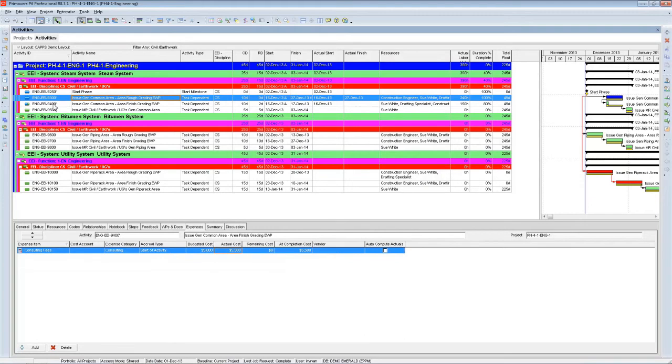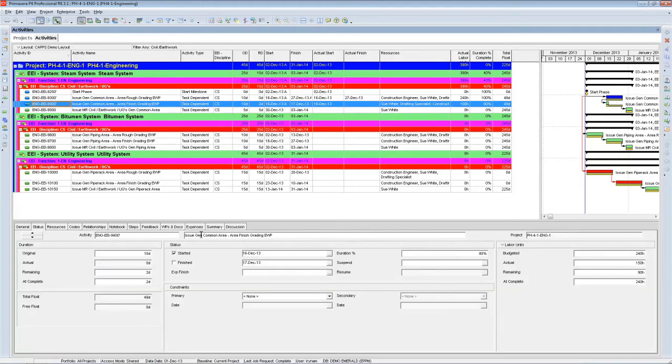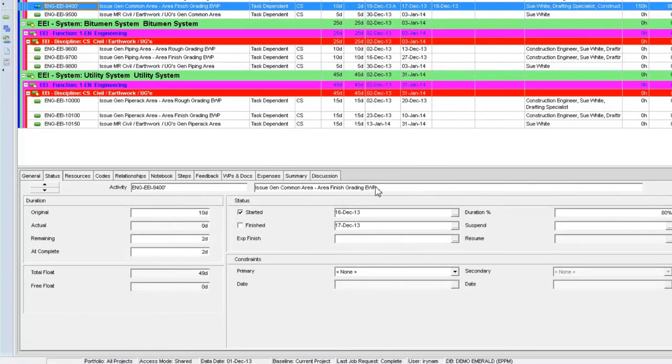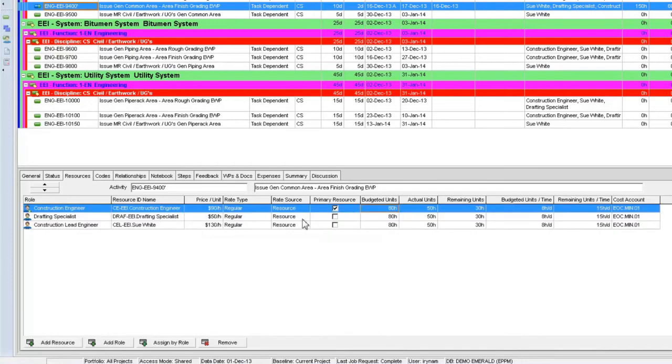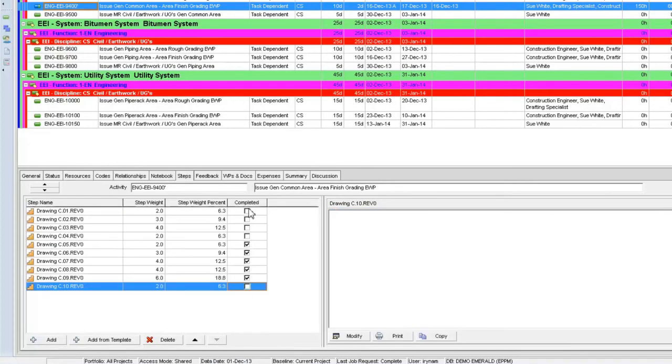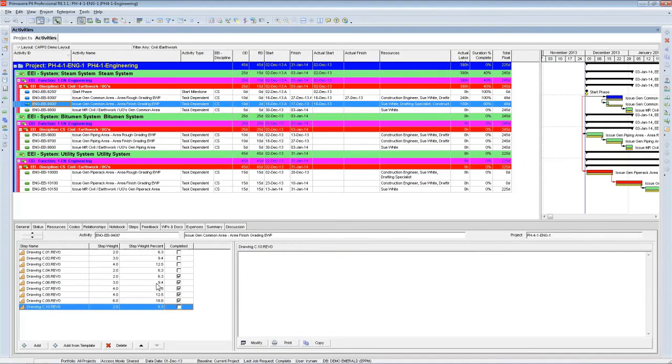Now for activity 9400, we can also see that there is an actual start date. And this activity is still in progress, so we have two days remaining. And this corresponds to the information that we entered using our online update form. And on the Resources tab, there are some actual units and remaining units, again, based on the update that we got. And on the Steps tab, we can see that some steps have been completed. So that corresponds to the update that has been done by our team member.